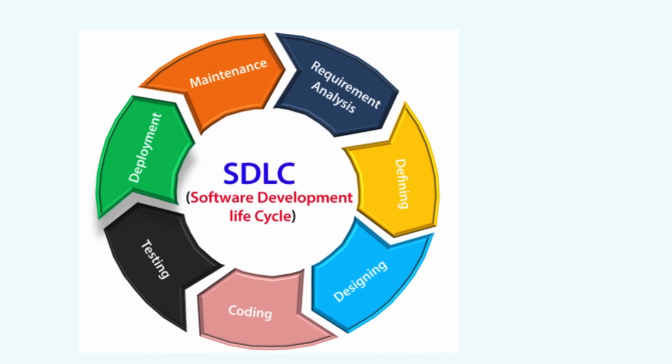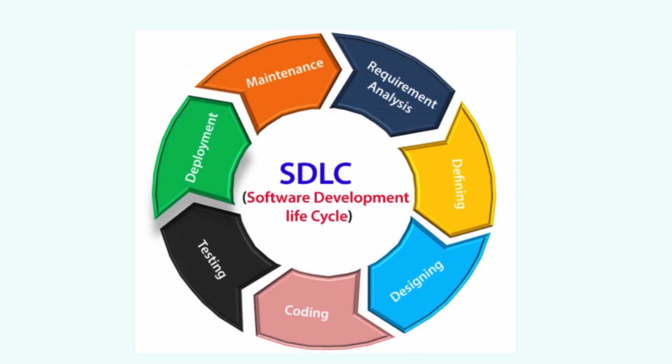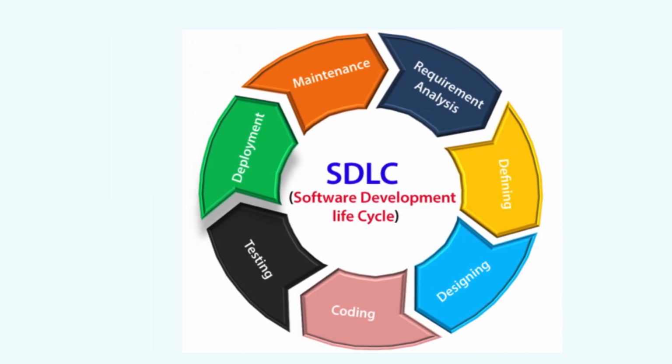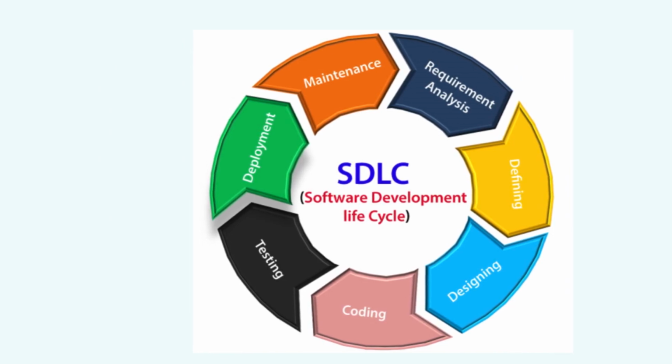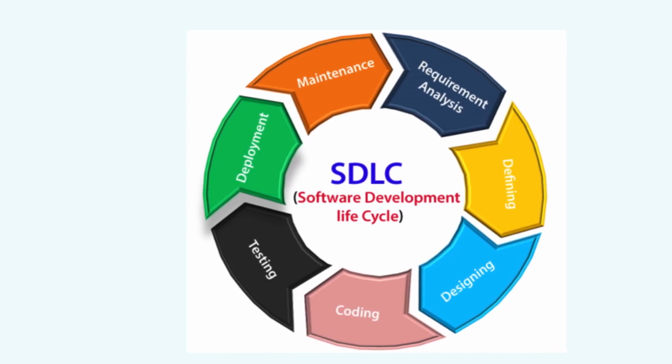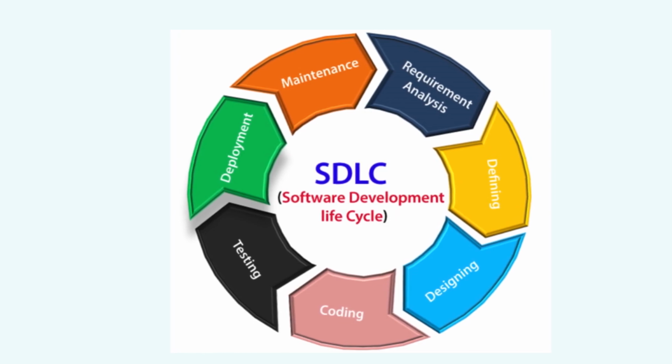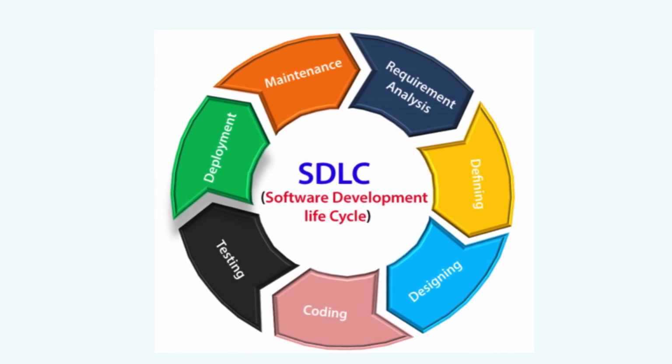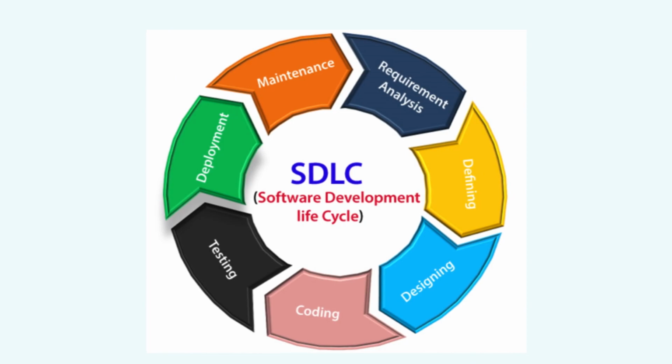Requirements analysis. Identify and gather detailed requirements from stakeholders to understand the purpose, features, and constraints of the software. Planning. Develop a project plan outlining tasks, timelines, resources, and potential risks. Determine the project scope, budget, and schedule.